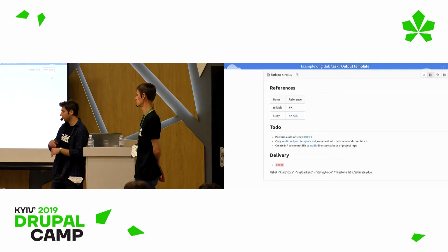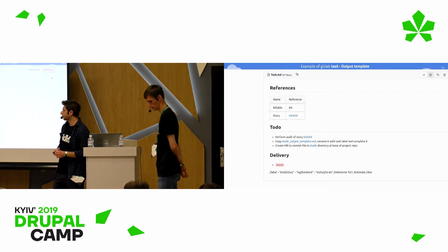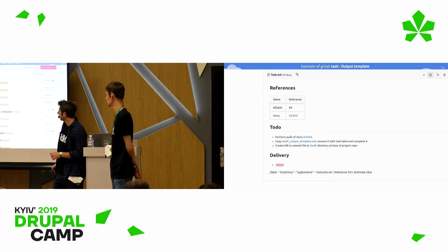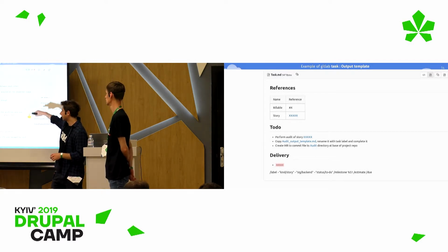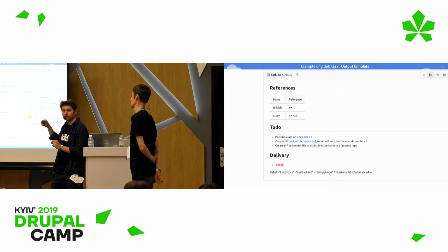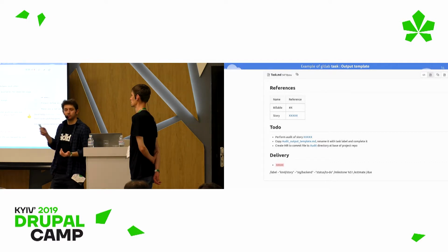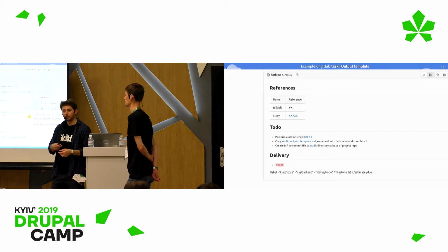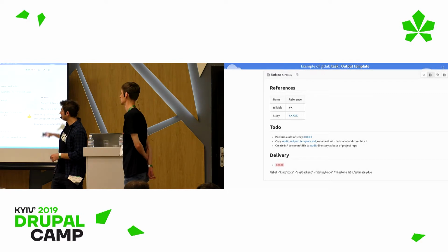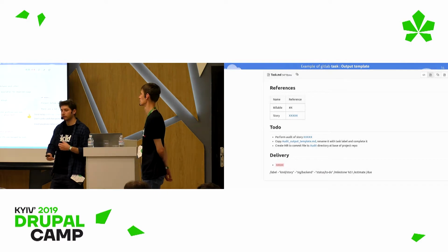When it's filled, it looks like this. We have an output for task resolution that we created like a Markdown template, that the developer is going to use, and he's going to use the acceptance criteria that we listed previously in the user story, and just check them. So first acceptance criteria: content types are not excessively numerous and redundant between each other. Are they? The developer will say, okay, they are redundant and excessive, or they are not, and why and how. So it really provides guidelines to the developer about what he should check and what he should provide results for.